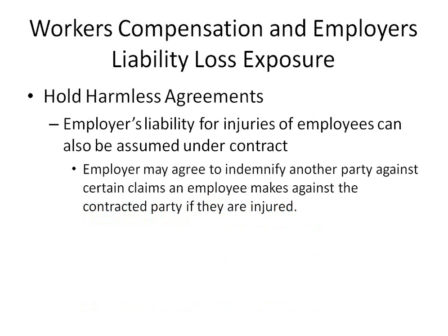Hold harmless agreements: employer's liability for injuries to employees can also be assumed under contract. An employer may agree to indemnify another party against certain claims an employee makes against the contracted party if they're injured.